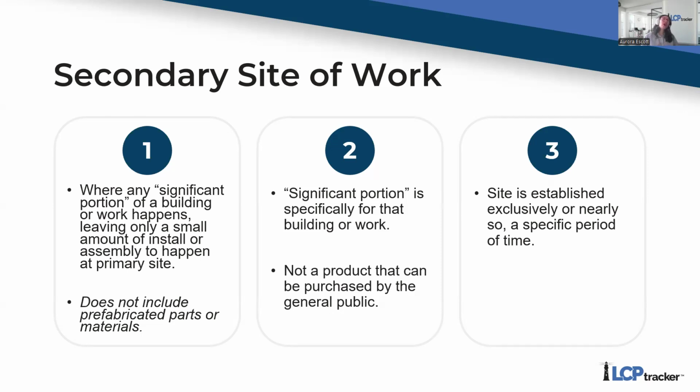The example that I like to use is building a bridge. You've got a river, you know where your bridge is going to start on one side of the bank and where it's going to end on the other side of the bank. You're not going to toss up a bridge right there at the side of the bank. No, you're probably going to have a secondary location where you're building a majority of the bridge by pieces, and then you're going to transport those pieces over to the side of the river, and you're going to Lego it together and build the bridge that way.